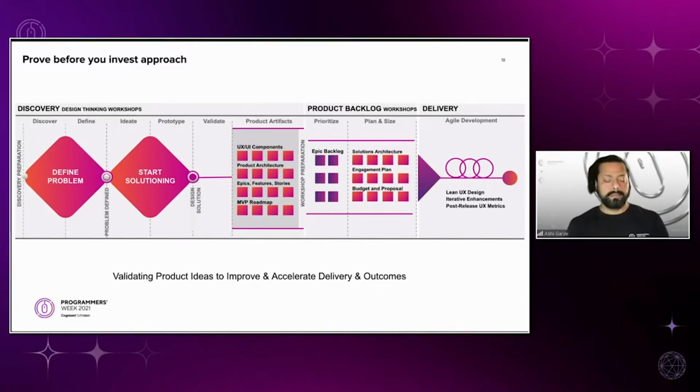At this stage, we don't want to deliver the whole thing. We want to deliver a thin vertical slice in a matter of 6 weeks or 8 weeks. So now in this overall journey, spanning about 6 to 8 weeks, you have completely de-risked the project. You have eliminated any ambiguity in terms of what the end product will look like, whether this will work or not work, whether our architecture is correct or not, what application framework will be right for this kind of product or platform. All that ambiguity is now gone.